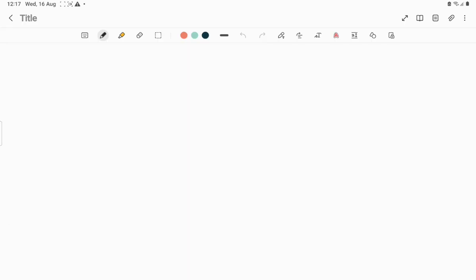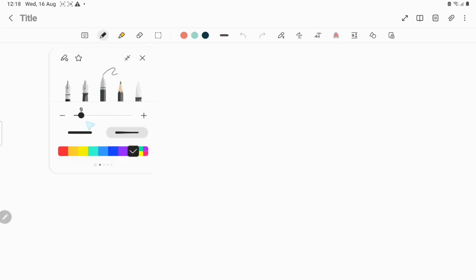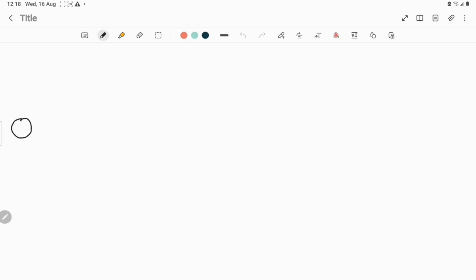So now I have taken a blank notepad of Samsung writing pad. I'll explain step by step how to construct a network. It is very easy, but sometimes we have some confusions. So let's see how to construct. First of all, construct an event. An event is a round circle like this, and an activity is a straight arrow line. So we will construct an event first of all.